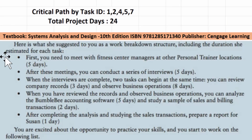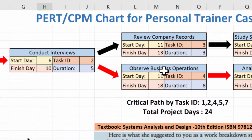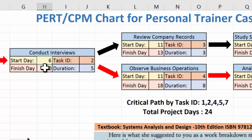When the interviews are complete, two tasks can begin. You can review company records and observe business operations. Reviewing company records has a three-day duration and observing business operations has an eight-day duration. We have to take the highest duration as our critical path, indicated by the red arrow. Review company records starts on day 11, and with three days it finishes on day 13.